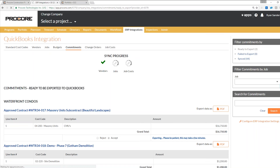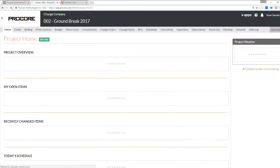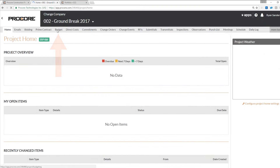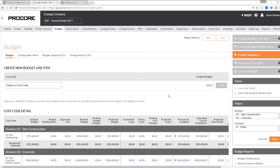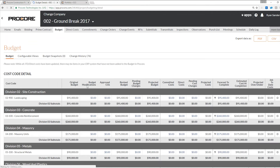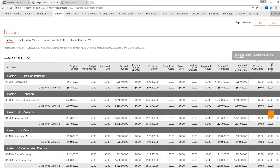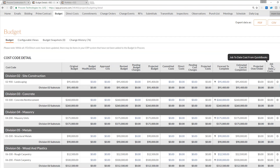The big win for any project manager looking to see real-time actuals flow from their accounting system into Procore is all going to be in the budget. Now when I enter my project and click into my budget tab, I can see the job-to-date cost being pulled in from QuickBooks right into my budget. You can see up top that I have all job-to-date direct costs updated, and there may be items in my ERP system not added to the Procore budget — so we will give you notifications at the top of your budget as well. This is the extra column showing job-to-date costs flowing into Procore from QuickBooks.